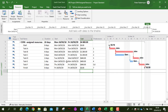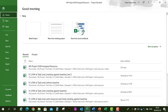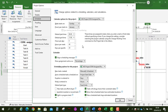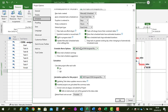Now let's prepare some settings. Go to File, then Options, then under Schedule, scroll down. Check that 'actual costs are always calculated by Project' is unticked, and that 'edits to total actual cost will be spread to the status date' is ticked — so that actual cost is spread up to the status date.